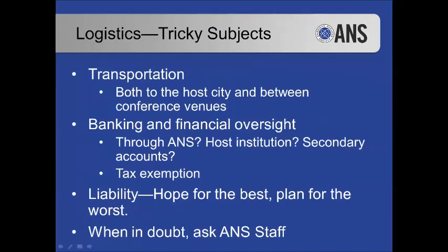But if you have transportation issues, people will remember it. So when you're writing your transportation section, don't just think about, oh, well, we need a shuttle from here to here. Really think about what shuttle companies are available, what is going to give us the best rate? How many buses can we get? Is this consistent with the number of attendees that we're thinking about? Again, that sort of attention to detail is important to showcase in your proposal.